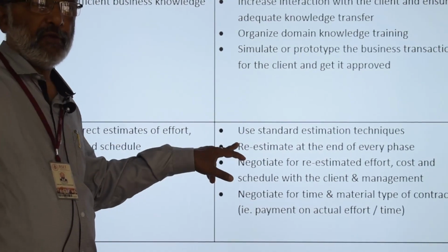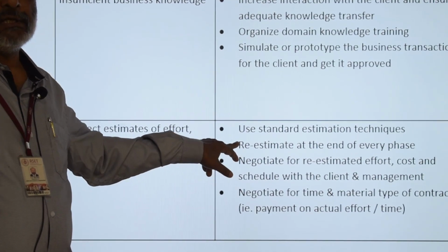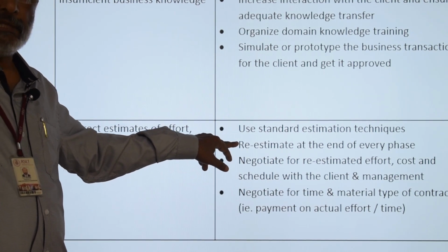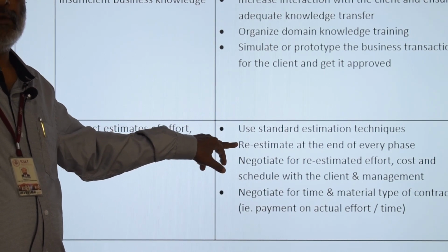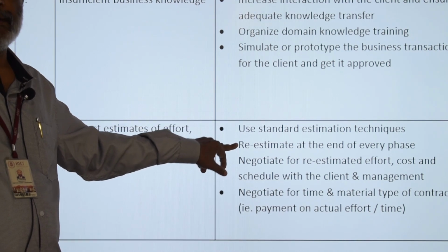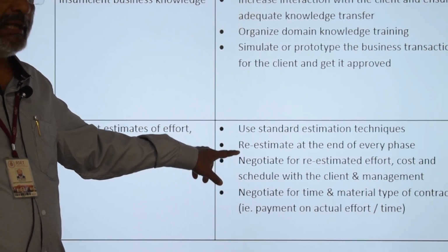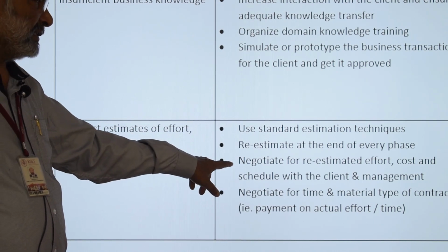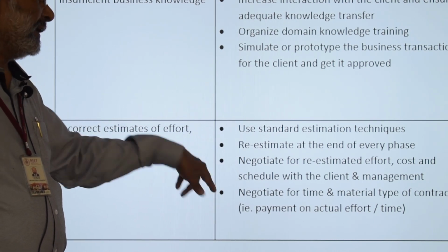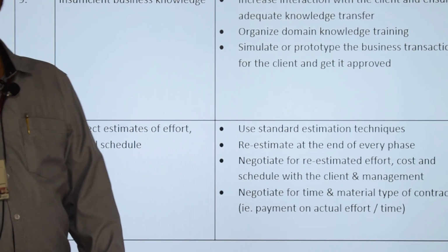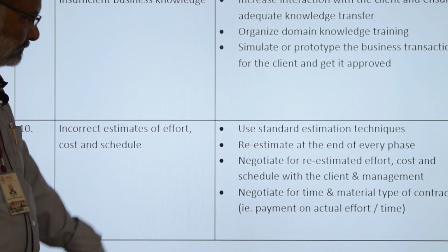Re-estimate at the end of every phase. It is not enough to estimate at the beginning of the project. You need to re-estimate the project in every phase, at the end of every phase, after SRS, after design, after coding. There will definitely be variations when you go on re-estimating, and whenever there is a variation in the re-estimation, negotiate the re-estimated effort, cost and time with the top management and the client.